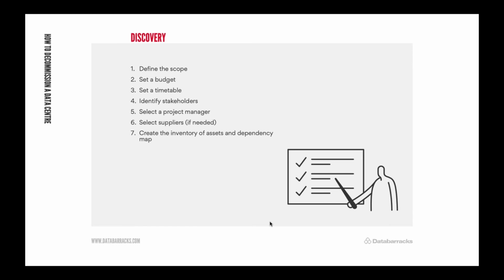That being said, and this is something we know from experience, whenever we do these projects, inevitably there will be detail in those repositories that needs to be updated. In almost every project, we end up making amendments and fixing and going back and updating that as you work through. If you've got a large environment, it's a good idea to run some automated discovery tools so you can get software to run across the environment. What you're trying to get at this stage is all the detail about the assets that you're going to be moving, all of the networking, and importantly, how each of those services are dependent on each other.